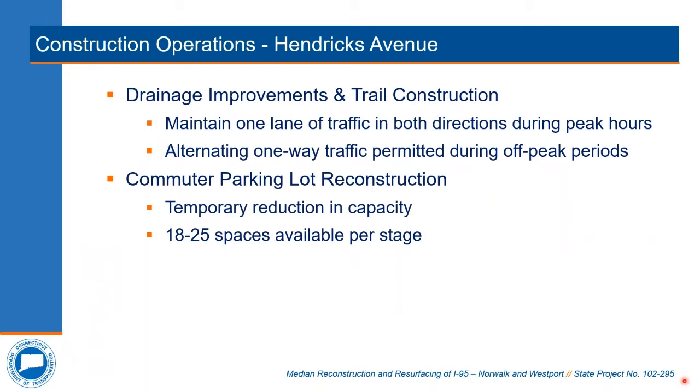Regarding the reconstruction of the commuter parking lot, the contractor will be allowed to reduce its existing capacity. The reconstruction is expected to be completed in 3 stages, with approximately 18 to 25 spaces available during each stage.